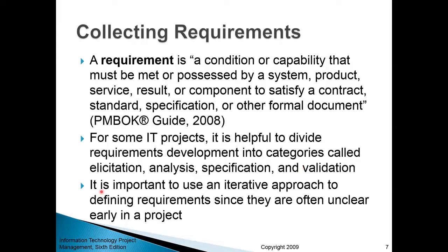of requirements. It is important to use an iterative approach to defining requirements since it's impossible for your users, for your stakeholders, from the very beginning to give you a comprehensive and clear list of requirements. During the early stages of a project, your users, your stakeholders may not know what kind of requirements they have. And it's only with the passage of time, as you proceed with your project, that your end users, your stakeholders start to gain a better understanding as to what needs to be done, what kind of features they want to see in your final product, and what kind of properties that final product needs to have.